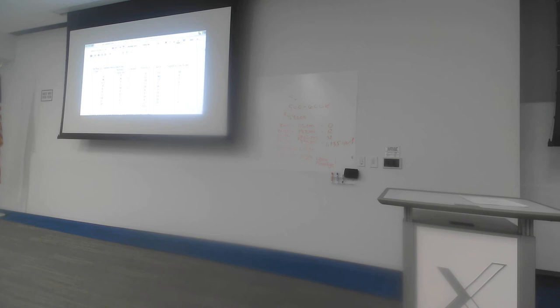So let's just, for argument's sake, go on to the other option that I was talking about before, which was just this B and E, crashing both of those simultaneously, because E is on the first original critical path, B is on this new critical path. If I bring them back or peel them back one day at a time each, the overall project duration will come back by a day. So B and E together, they cost 4 plus 5, which is €9. So let's try that out. The overall duration will come from 14 down to 13.